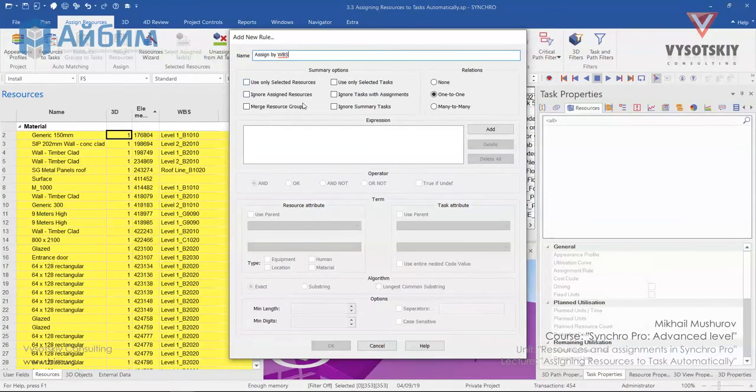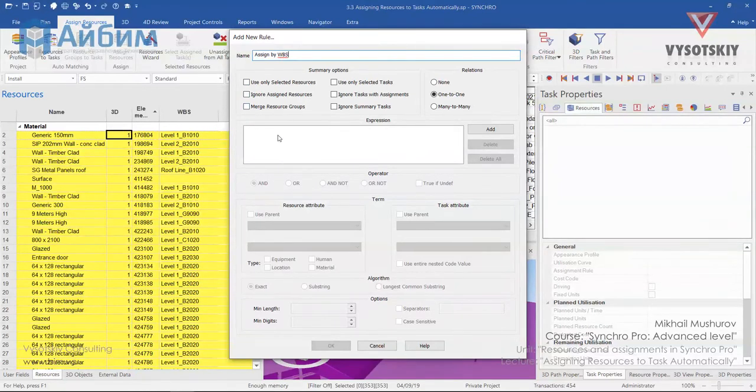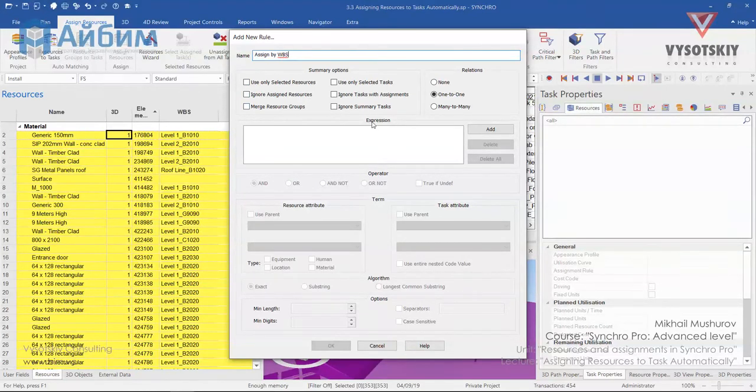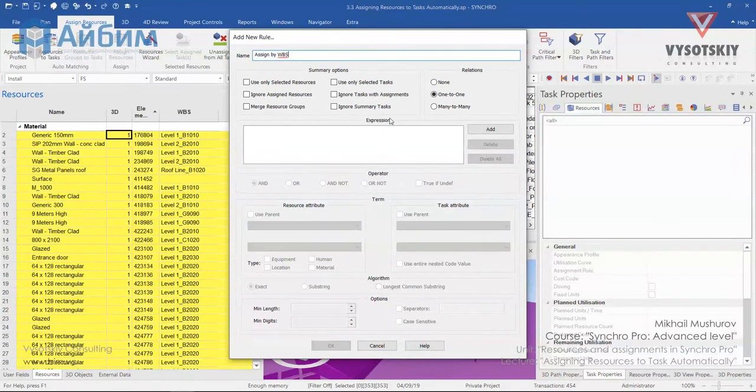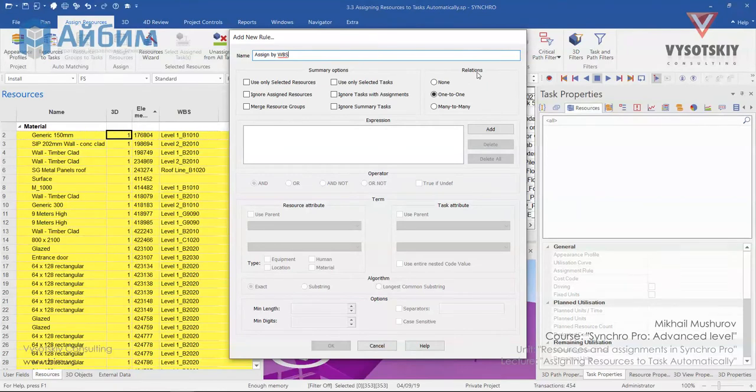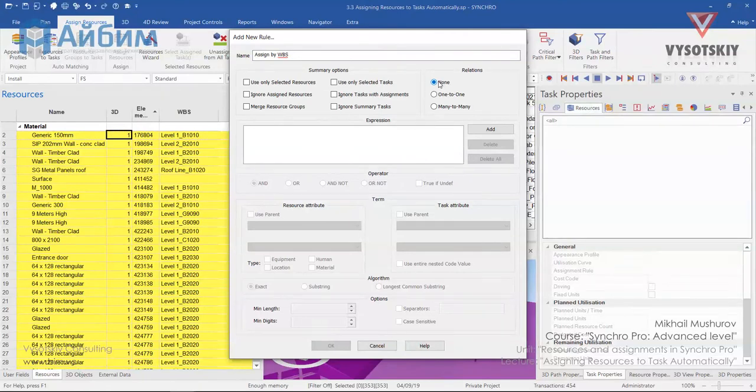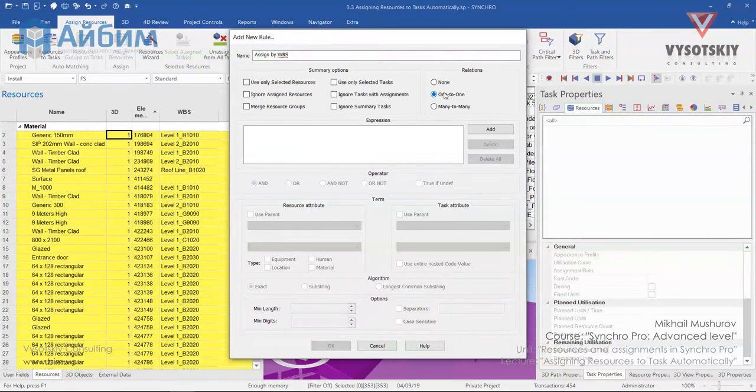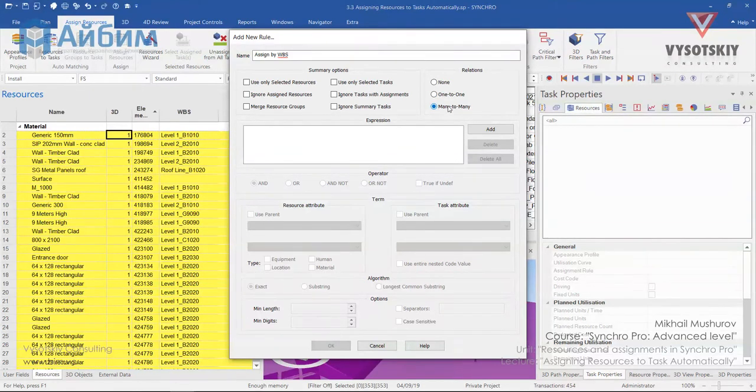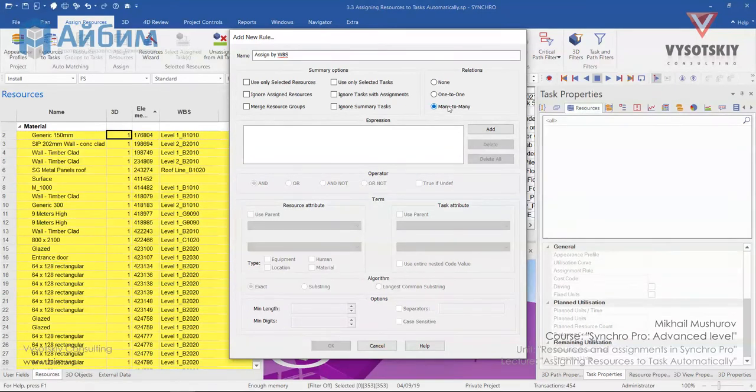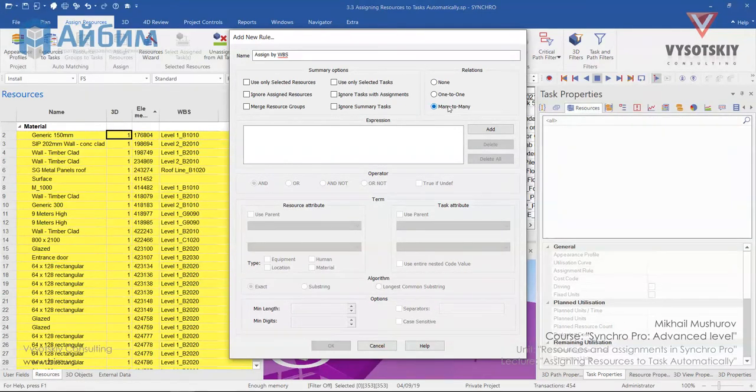On the left, you define rules for resources and resource groups. On the right, the same options for tasks. The relations used to set different linkage when searches applied and match found. Option None stands for not applying linkage between resources and tasks. One-to-one is one resource can be assigned to one activity. And Many-to-many is multiple resources can be assigned to one or multiple tasks simultaneously.